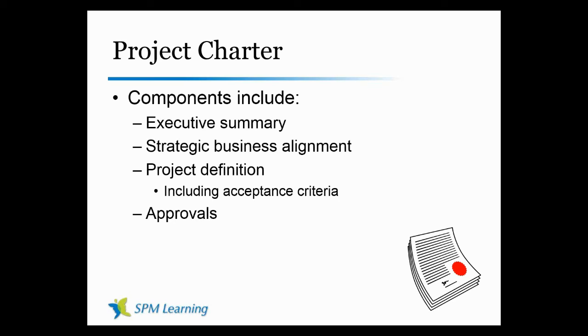Now, at the beginning of our journey, we start out at initiating. We often don't have all of those details, so we use this thing called progressive elaboration and iteration. If I'm doing a small, short project, I probably have all the details I need. However, if I'm starting into a long, large project, and this might be a big 5-year initiative, I probably don't have many details at this point.